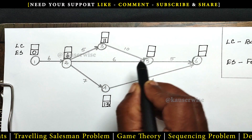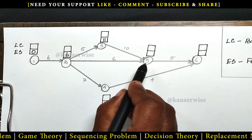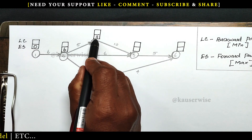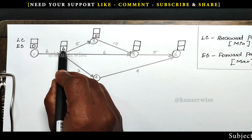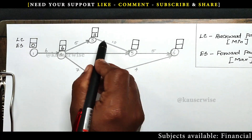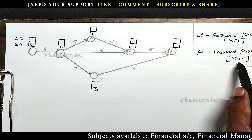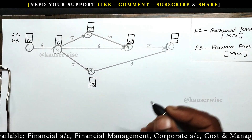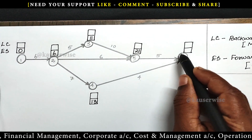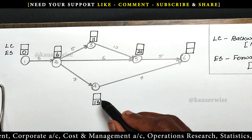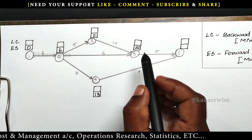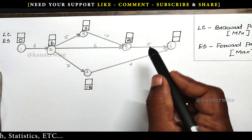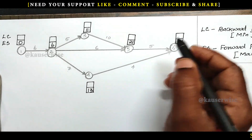Next, node 5. Here we have two options: from 3 to 5, and 2 to 5. We have to select the maximum duration. For the first option: 11 plus 10 equals 21. The second option: 6 plus 6 equals 12. Which is the maximum? 21 is the maximum, so for forward pass we select 11 plus 10 equals 21. The next one is the last node — node 6 — and again we have two options: 5 to 6 and 4 to 6. We select the maximum: 21 plus 5 equals 26; second option 13 plus 4 equals 17. Maximum is 21 plus 5 equals 26.